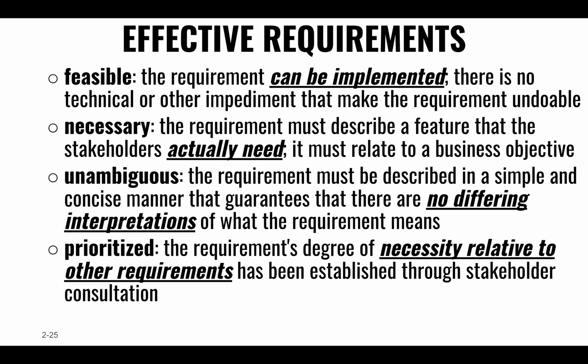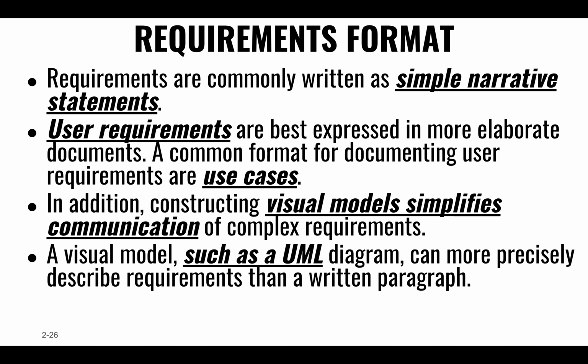Make sure that what is being asked is unambiguous and doesn't have multiple interpretations, right? When you're building it, I can interpret this as a drop-down, or I can interpret it as an input field. Also prioritize. At some point, somebody needs to tell us, okay, out of all these thousands of things that we need to build, where do I start? Usually by priority, right? Whatever's highest priority, I like to get started on that, so that if we run out of money or run out of time, at least I have some core functionality done going out the door.